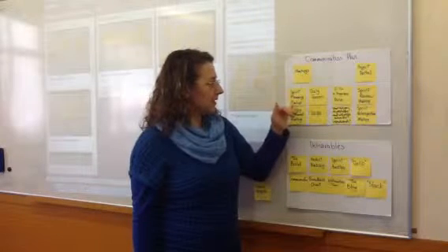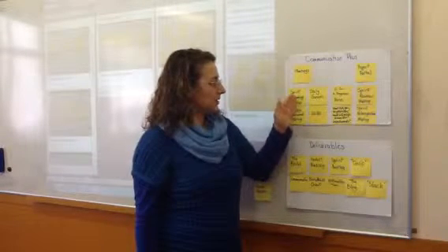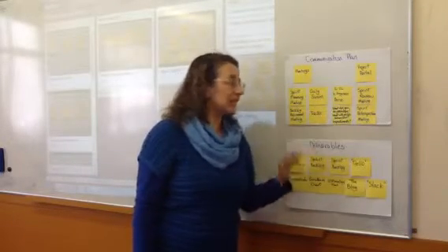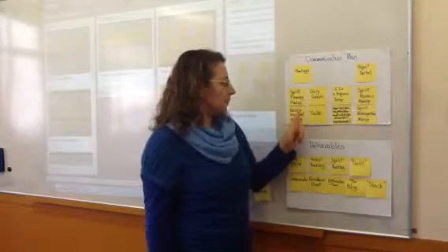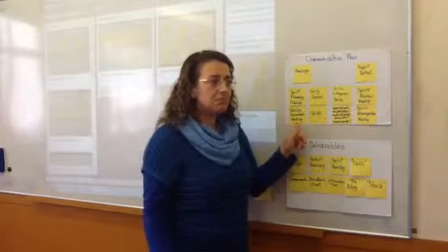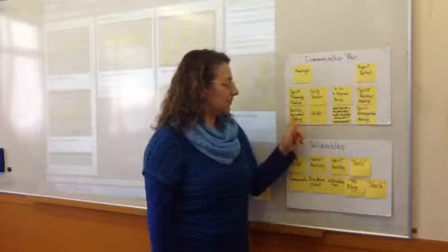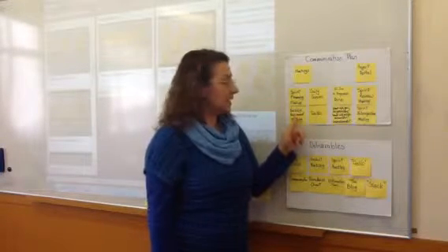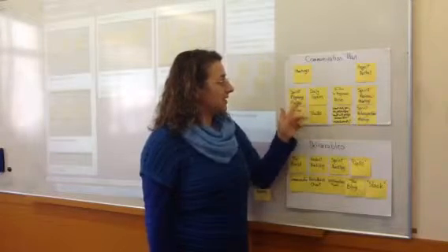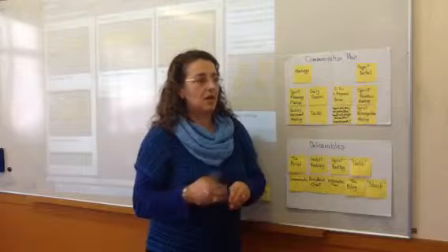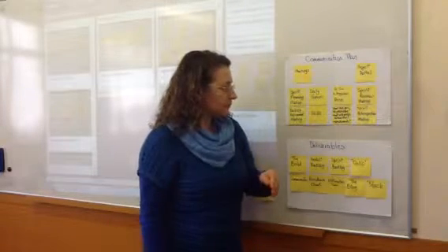In between, during those sprint implementation or sprint execution, we're also planning to have backlog refinement meetings, perhaps for 2 hours, and that will probably happen once or twice to refine the actual requirements that we've set out for the upcoming sprints.